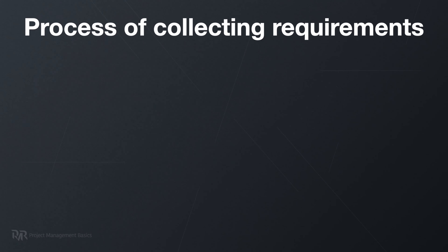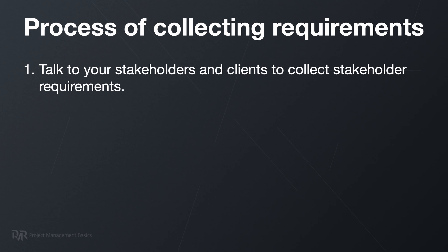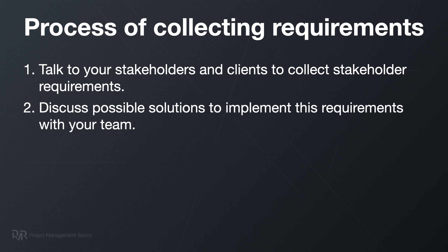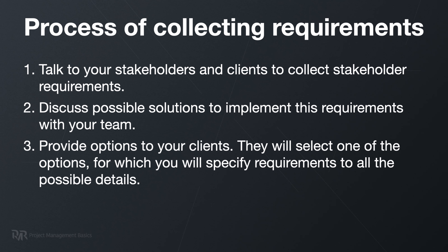That's the overall mindset to filter out unnecessary requirements. Now let's talk about the process of collecting requirements. First, you need to talk with your stakeholders and clients and collect stakeholder requirements — these are requirements they think will help them to achieve the project objective. You take these high-level stakeholder requirements and go to your team to discuss possible solutions to implement them.